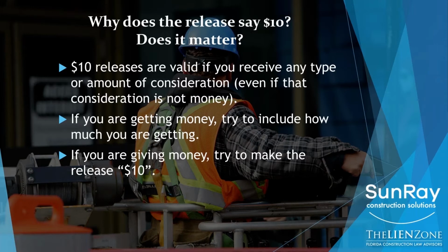And the reason I want to say $10 is that I don't want any argument later when the subcontractor comes to my office to pick up the check, or I mail it to him or her, and they say, wait, you only sent me $20,000, it should have been 25.